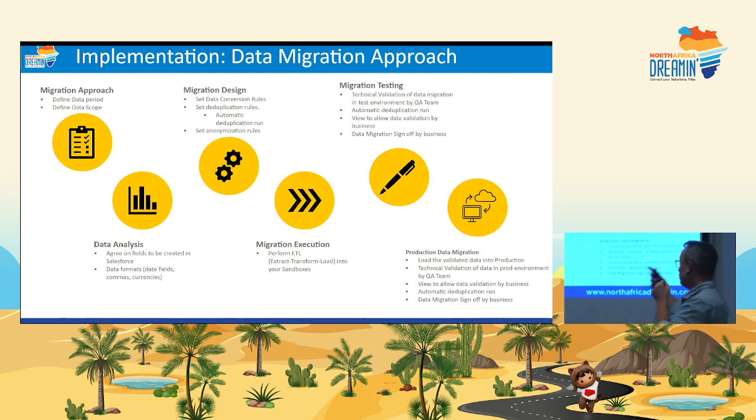And then when you migrate to prod, this is a step that sometimes gets underestimated, because you've done everything in test and it's worked fine. You repeat the same steps, which is what you should be doing, but don't forget that once you've done those steps, they need to be validated again. Your QA team should validate and confirm that everything has gone according to plan, because just repeating the steps doesn't always cover everything.